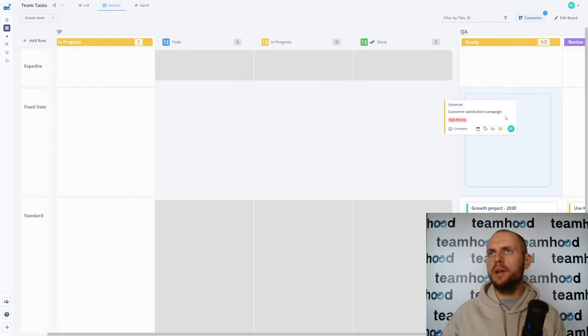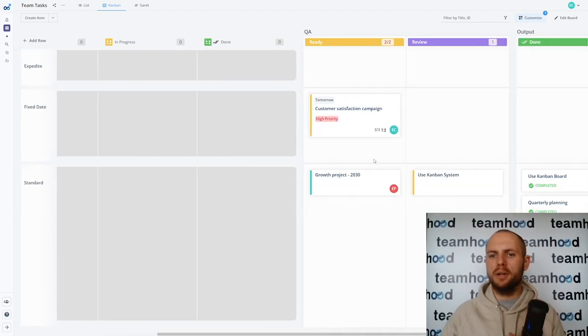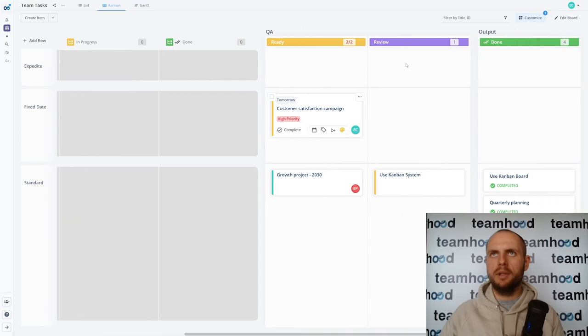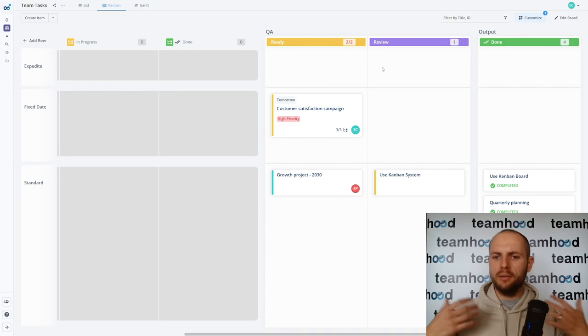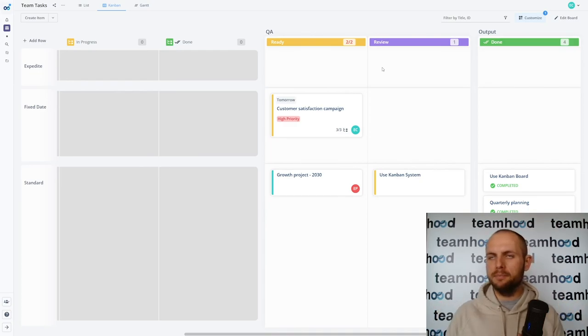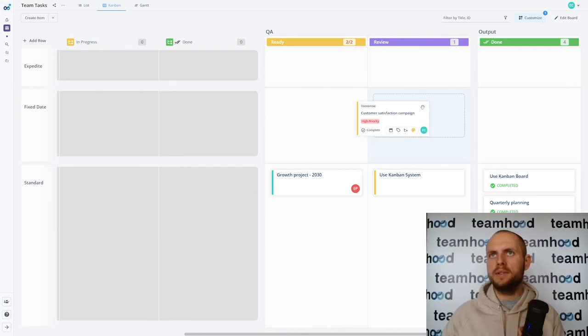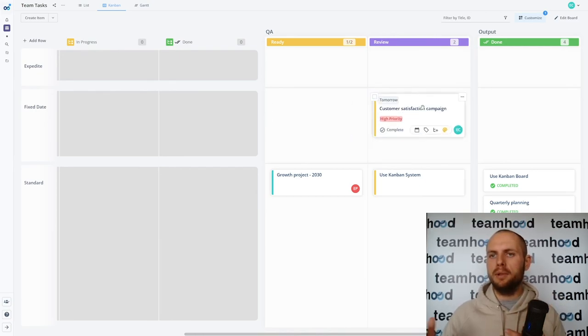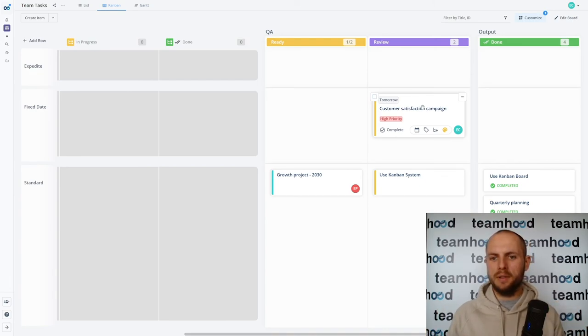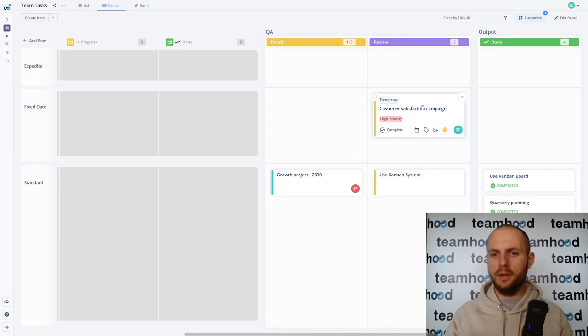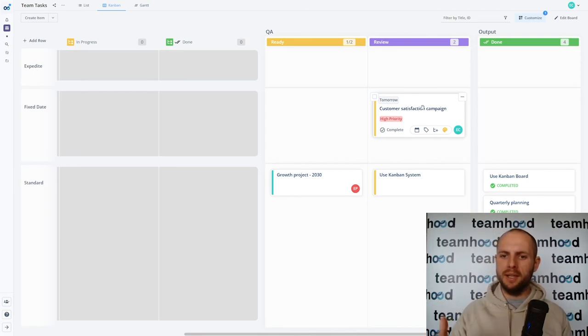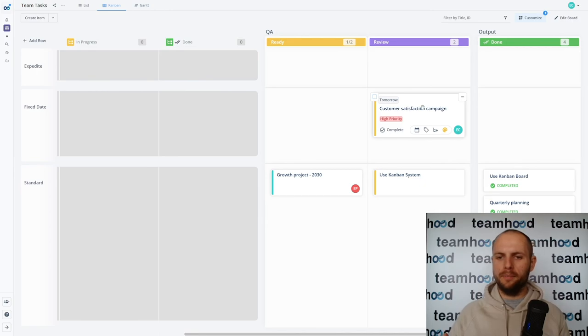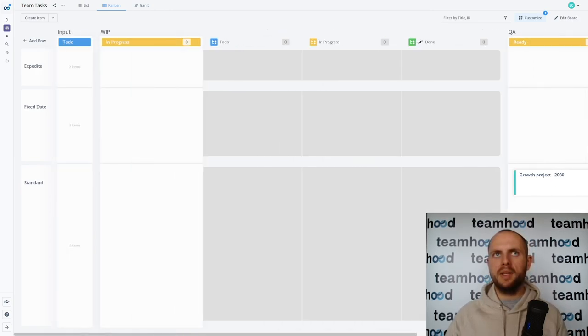I just put it to ready because people will not start working on it right away to review because maybe I have someone else, somebody else to do the review. They will see that there is already an item waiting and they will say if my review takes significant amount of time I will move it to the stage and I will do the review. And it is important because Kanban system is a pull system. You shouldn't be pushing things to other statuses. You should be placing them so people can take and work on those important tasks.